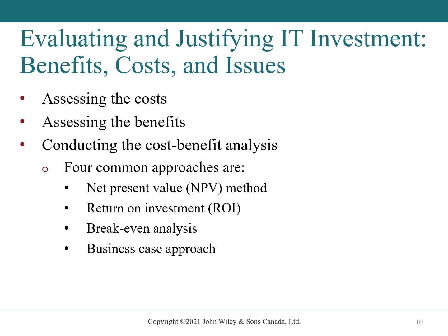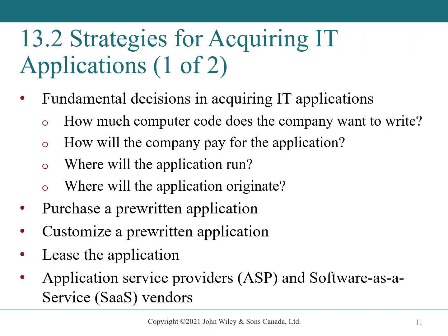Break-even analysis determines the point at which the cumulative dollar value of the benefits from the project equals the investment made into the project. The business case approach uses a written business case to justify funding for one or more specific applications or projects. IS and IT professionals will provide the input for the development of business cases, and the business cases will describe what you do, how you do it, and how a new system could better support the organization.